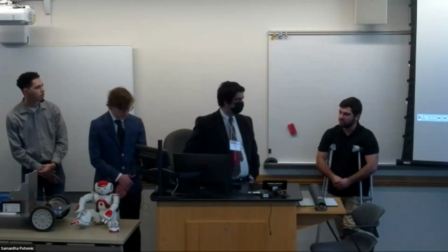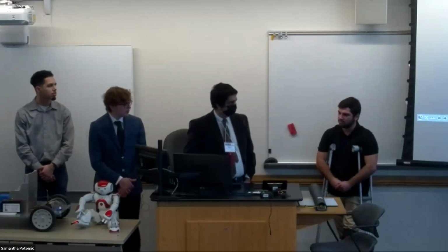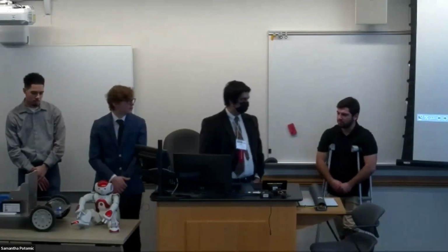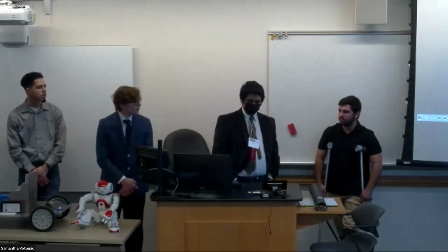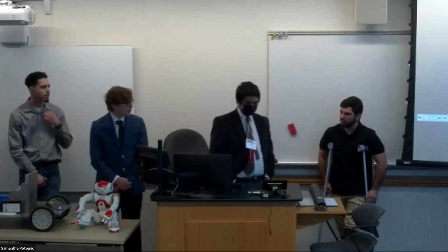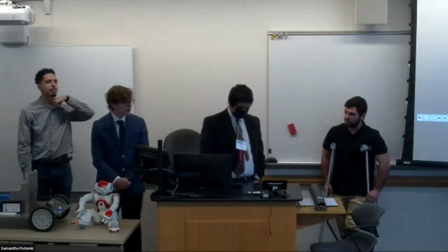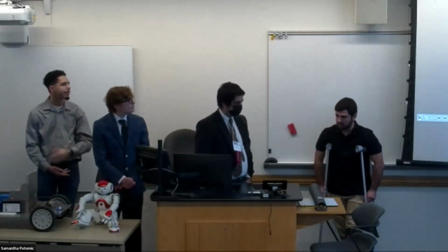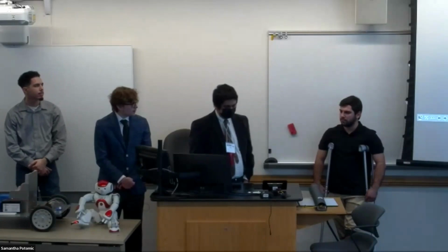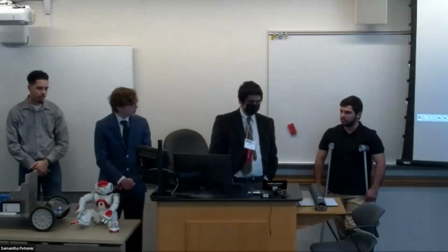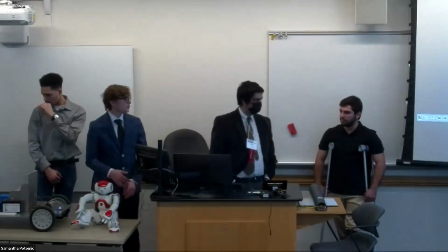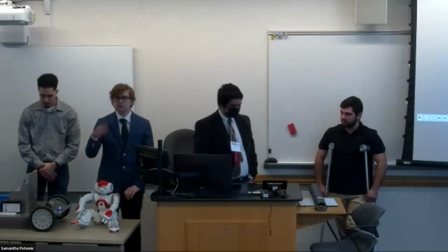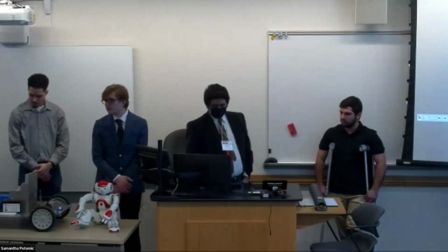We've been working pretty consistently over both semesters, but there have been a couple of dips and bursts. A lot of the time we were waiting for parts to come in the mail or for 3D parts to print, so we couldn't do as much work as we'd like, and we were a little behind schedule. But other weeks, when we had something in front of us to work on, we were able to put in extra work. It's been a roller coaster, up and down experience with this kind of project.